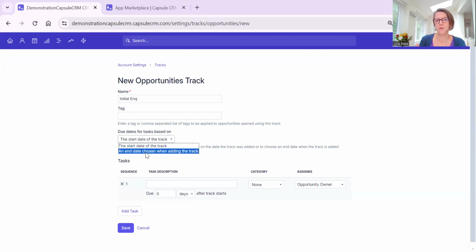You could have a process that you go through when you organize an event. So it would be event date minus 1 week, confirm the delegates; minus 2 weeks, so 2 weeks before the event, you might ask for dietary requirements; 3 weeks before the event, you might confirm the venue or send out invitations or whatever. But we can work backwards from the date of the event and we can have a process for that. We're just working backwards instead of forwards.